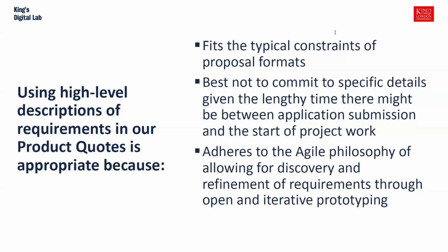But that's not even a desirable thing to do because, again, in arts and humanities funding, it's quite common for there to be rather a large gap between when you put the funding application in and when work starts. It's usually at least 6 months. It could well be 9 months. It could sometimes be a year before you actually start work on the thing that you put into the product quote. And then thirdly, it accords with typical agile principles of starting with something that's more high level and kind of general, a bit vague, a bit sort of blue sky concept, and then you work your way down to something more specific through the famous rapid iterative prototyping.